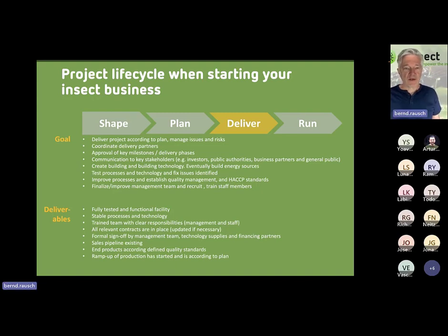And then that is really the project delivering. In the delivery phase, you actually deliver the project. You create the building. I think very important as well is ongoing communication to your key stakeholders, to keep the investors, the public authorities and your business partners, meaning suppliers and buyers, in the loop. So in case there is a move in timelines or milestones, they are aware at an early point in time. Or if you are quicker than planned, your suppliers and buyers need to be aware that you are delivering earlier. So make sure you keep the communication in place.